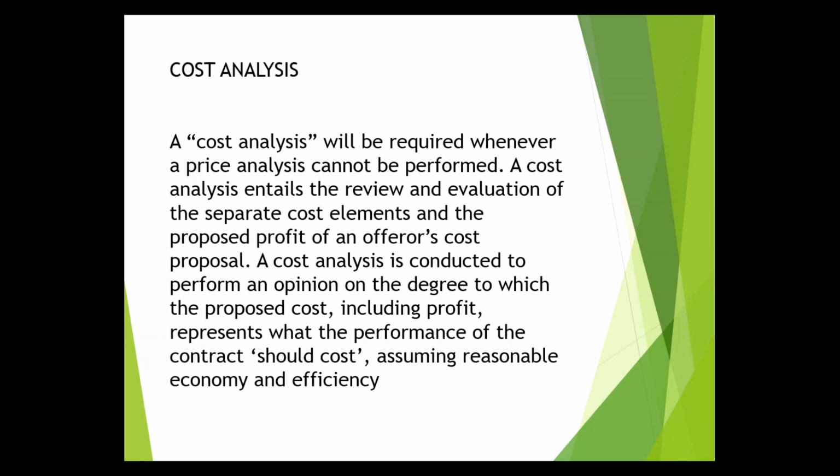The product or service being offered is not susceptible to being evaluated against other commercially available items or similar products or services. This is also when the cost analysis is going to come into play. Examples of this might include a procurement for a consultant to come in and help you out with an ADA plan, any procurement for professional services where no competing price proposals are submitted, as in a procurement for architectural engineering services if you get into the A&E world, and where only one cost proposal is solicited from the highest ranking firm, or a sole source procurement for other types of services.